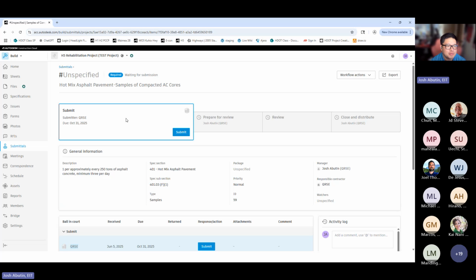That's where the communication part is key. Work with the contractor early, establishing this new process, and make sure both sides are aware that this is how you're setting up the project and you're already creating all of these submittals. If any changes need to be made, like slight changes to the titles, they can always coordinate with you. The placeholder is already there, and they can just use that to start their submittal.